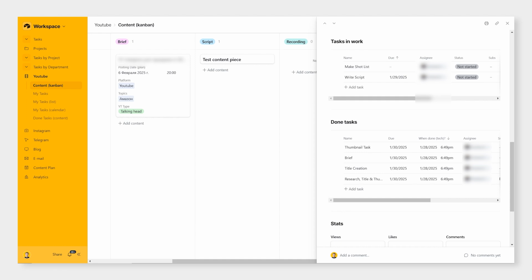There's also one more thing. We have a review module in the system. So if you change the status to review, the assignee will change to a reviewer, a special property. And when we change the status either to in progress or incomplete, the assignee will change back. That is done for correct workload calculation and for correct statistics calculation, which we are going to review right now.